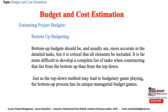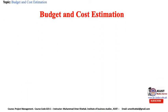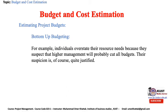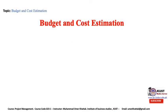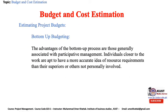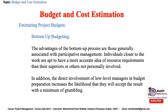Just as the top-down method may lead to budgetary game playing, the bottom-up process has its unique managerial budget games. For example, individuals overstate their resource needs because they suspect that higher management will probably cut all budgets — a suspicion that is quite justified. Managers who are particularly persuasive sometimes win, but those who are consistently honest and have high credibility win more often. The advantages of the bottom-up process are those generally associated with participative management: individuals closer to the work are apt to have more accurate ideas of resource requirements. Direct involvement of low-level managers also increases the likelihood that they will accept the result with a minimum of grumbling.